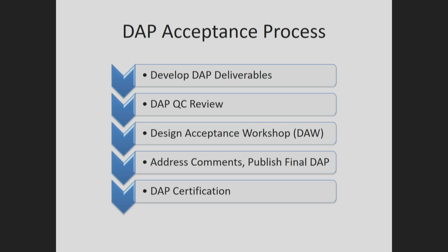I've been guilty in the past, when I'm under a deadline for a schedule, that maybe one unit was overworked and you didn't have enough time to get a consultant contract in place, because that takes about 6 months, and you're behind schedule, and it's pretty easy just to slide through DAP and say, oh, hydraulics isn't here, we'll just give me an assumption, okay, $1.5 million, that'll take care of it. So you're rolling, and you get down to final plans, and hydraulics slides in and says, oh, $3.5 million. Like, what?